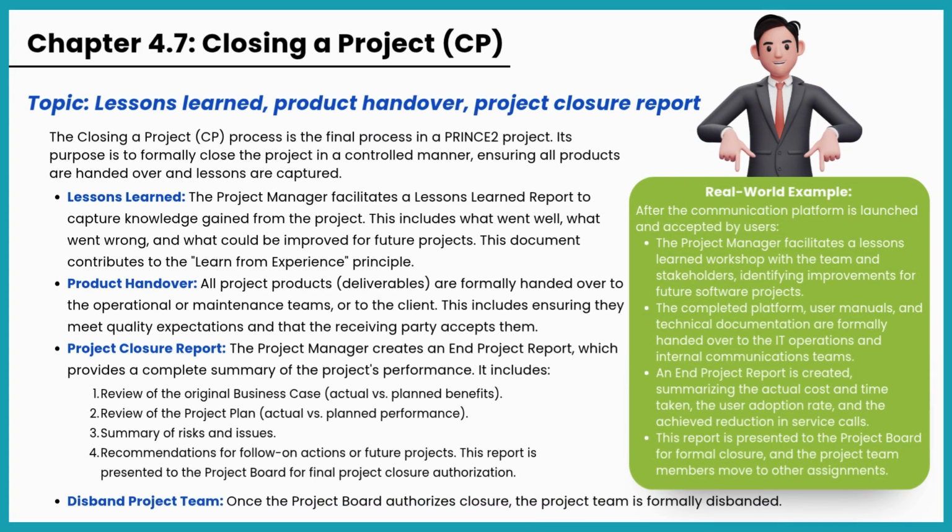Closing a project is about tying up loose ends and learning for the future. It's crucial to do it formally. You capture lessons learned so others don't repeat your mistakes. You ensure all products are formally handed over to the people who will use or maintain them. And the end project report gives a final verdict on performance and value. It's not just finishing, it's completing the cycle and preparing for the next success.